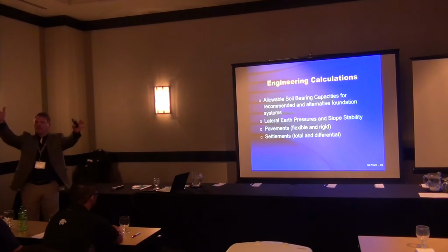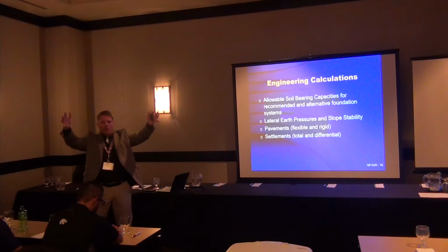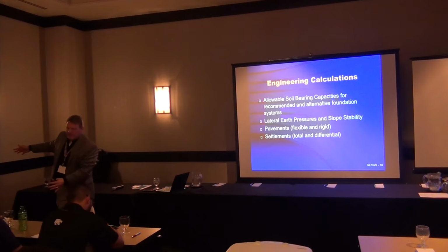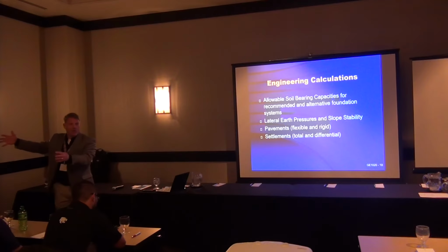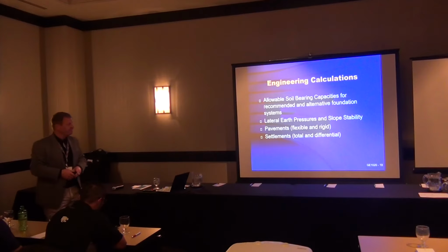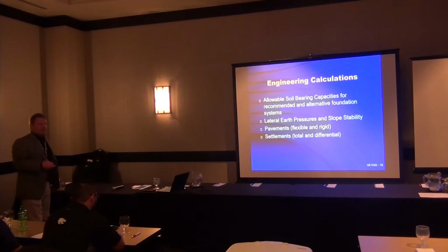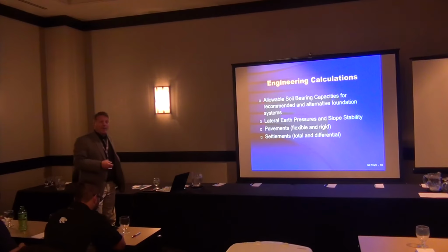The wall can literally, the whole retaining wall, whether it's an MSE wall or a gravity wall or a reinforced concrete wall, the whole thing can move down the hill and stay intact. And the wall design was fine, but the global stability analysis was not. So keep that in mind in your contracting for those, because it kind of falls in a gap.